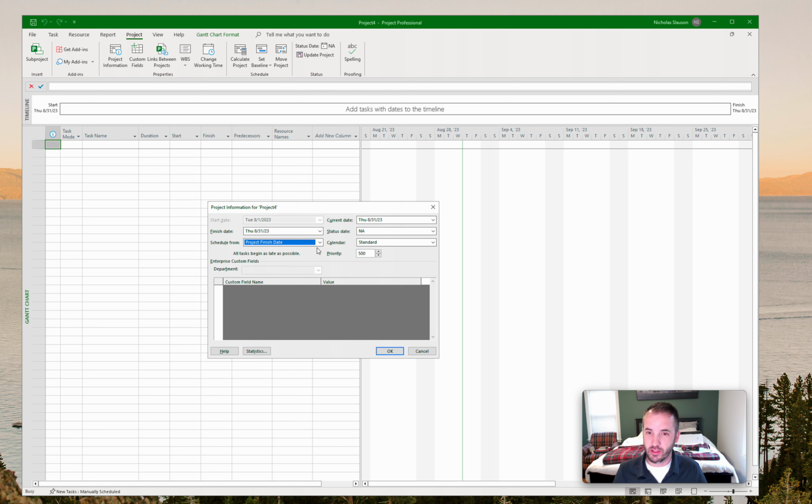It's a great way to do it in theory, but when you're scheduling that way, it pushes everything back and forward, and you may not realize what your sequence is, or where you're off. So I recommend everybody work with project start, and then if you end up over duration, it's a lot easier to go in and start working areas and things like that to figure out what we need to do to get back within duration.